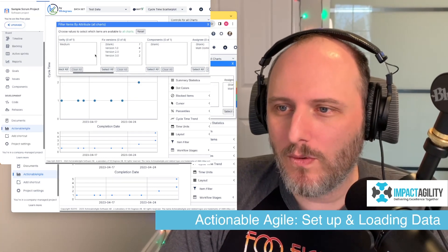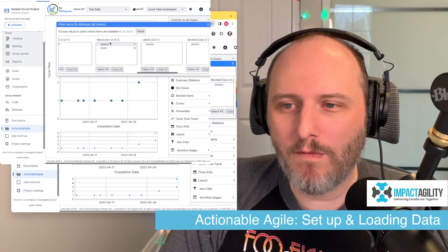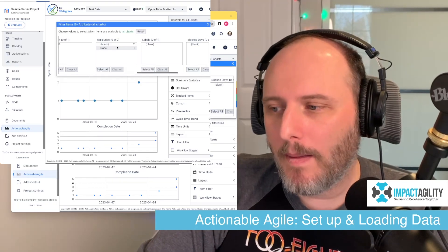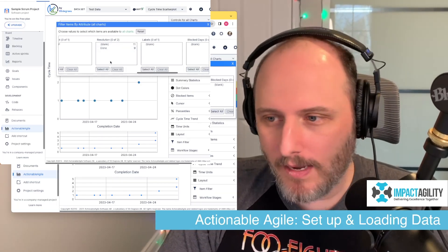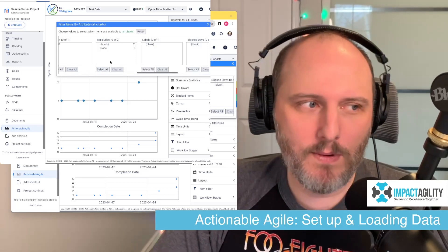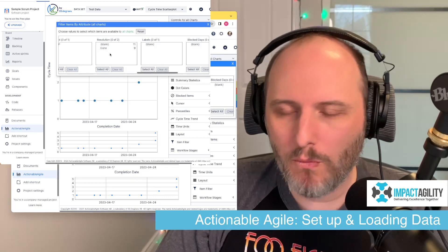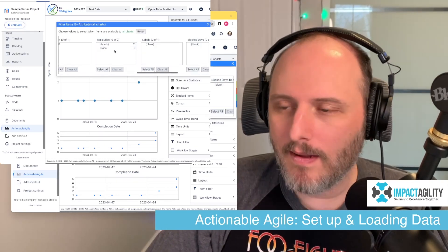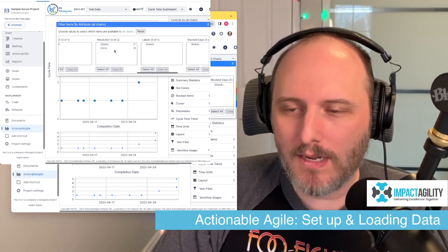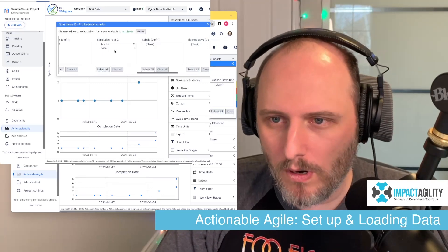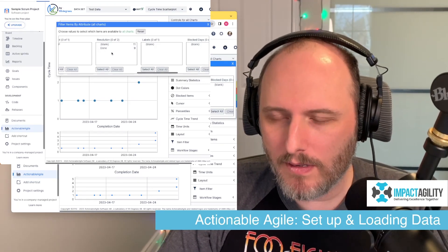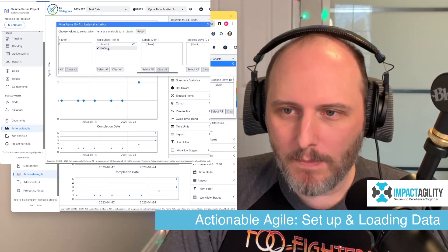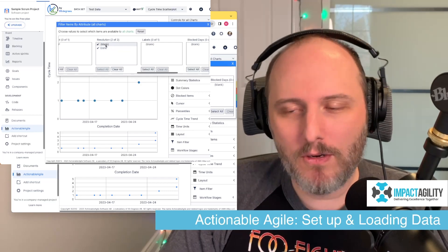The other issue I find constantly with companies is around the resolution field. Mine is a simple project — I only have either a blank resolution or Done. But many teams also use other resolutions for things that are invalid, won't fix, or won't do — things that were added and then decided against. If that's the case, you'll want to filter those out, because if you're measuring cycle time of how long it takes to get things to done, you probably don't want to include items you specifically decided not to do. Come to the resolution section and filter to only items completed with a resolution of Done — and if your Jira is set up oddly, done items may have a blank resolution, so you might want to pick that too.